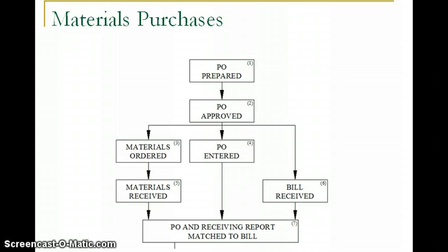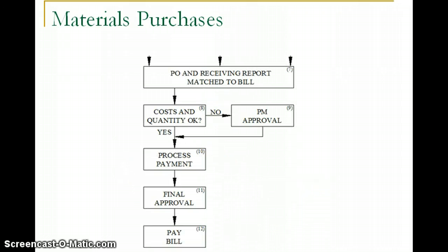Once the materials are received, the PM or field personnel will verify that the materials received match the order, and they will then proceed to process the payment for that vendor. The PM will ultimately issue the approval for payment.